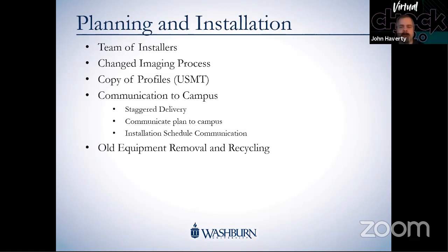We had a team of installers, made up of 3 full-time staff and 3 student workers. That team was basically set, if I remember correctly, about September, October timeframe, right before the first delivery came in. We started getting all that put into place, having meetings, figuring out what the process was going to look like, what they were going to be doing, where they were going to be located, how they were going to be receiving systems, tagging, that type of thing.